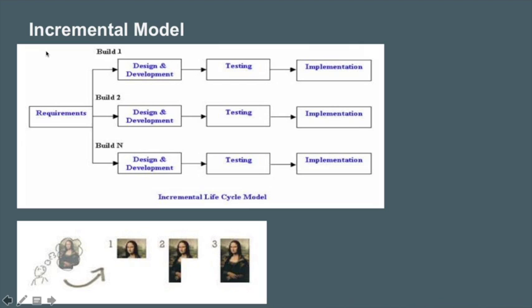I will talk about what the incremental model is, its advantages, disadvantages, and when to use it. In the incremental model, the whole requirement is divided into various builds. Multiple development cycles take place here, making the life cycle a multi-waterfall cycle. Cycles are divided into smaller, more easily managed modules. The incremental model is a type of software development model like the V model, Agile model, and so on. In this model, each module passes through the requirement, design, development, testing, and implementation phases.